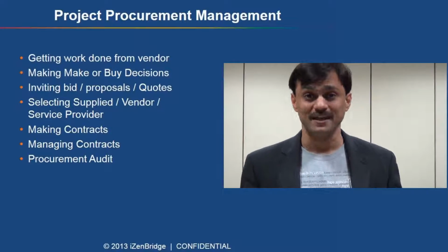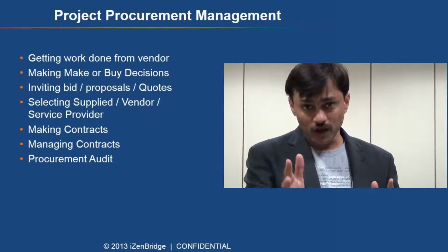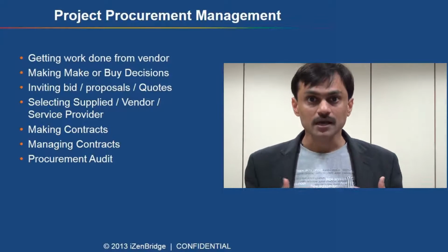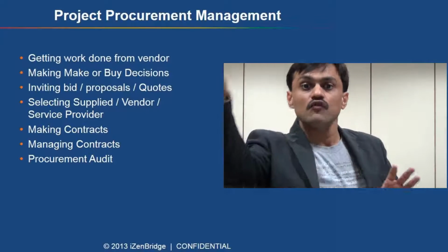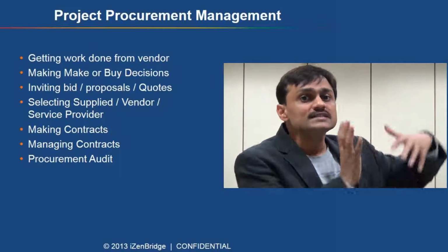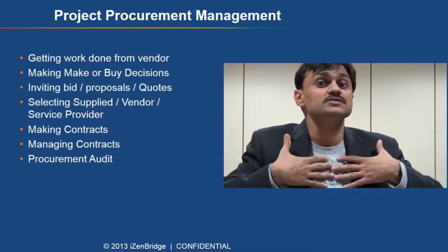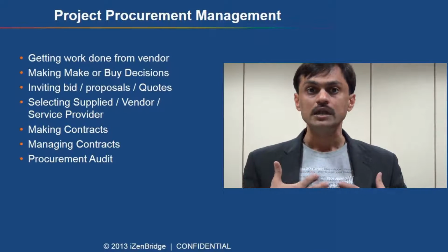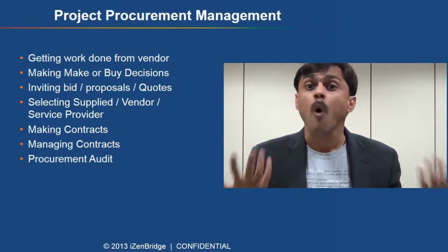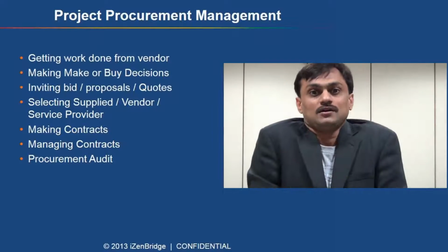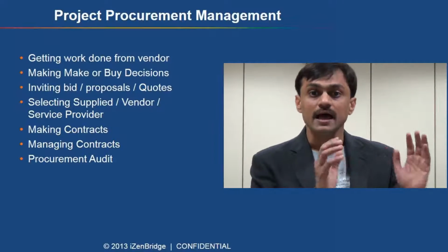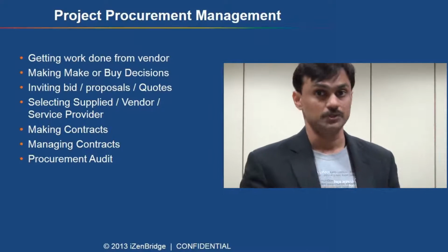Project procurement management. Now this is one knowledge area most of you may not find much familiarity with. Because it is about getting work from someone else, outsourcing part of your work to a vendor or a service provider. Now here you become the customer. In this knowledge area, we learn how we should identify a statement of work, how we should invite other vendors for our work, like invitation for quotation, request for proposals, those kind of things come under this particular knowledge area.